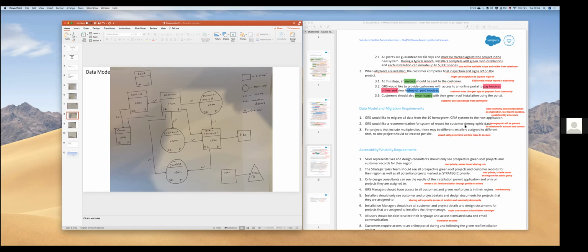So if I'm going live on a Monday, then I will do my data load on Sunday? No, no, that's not how it works. You need to be fully prepared, because it's not only the data migration you'll be doing. So it needs to be done, maybe I would say, at least a week prior to that, because after that you will have your users and everything you need to create, right, in the production.